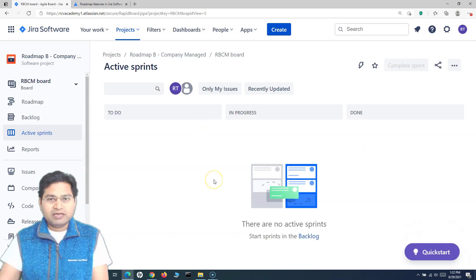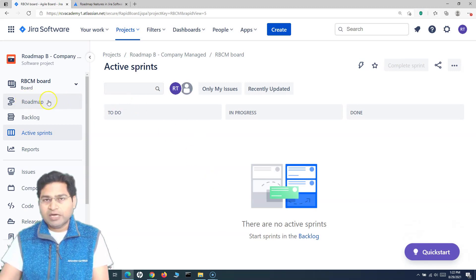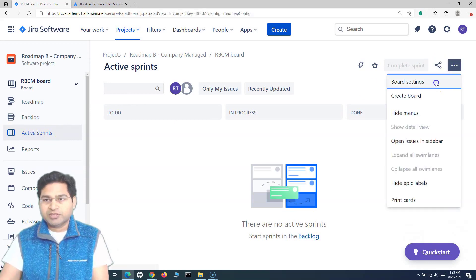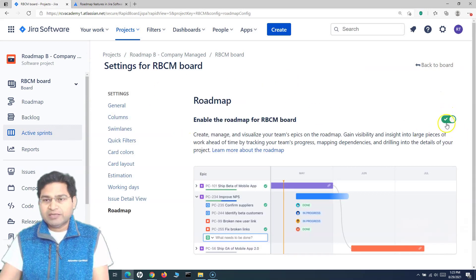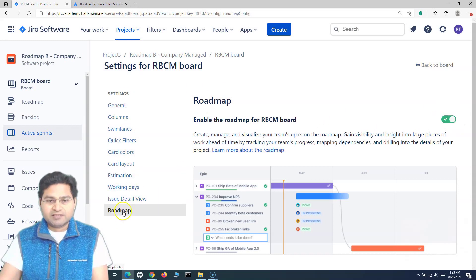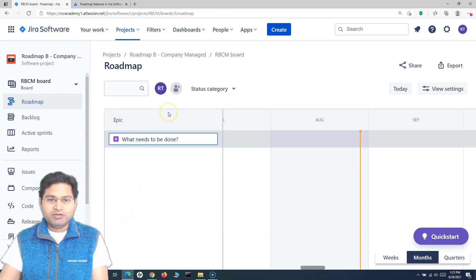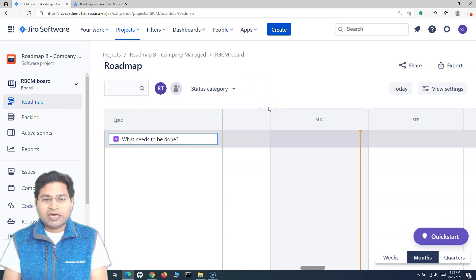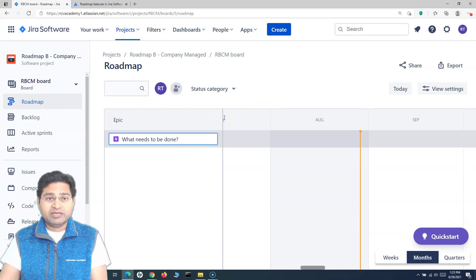Let's pick the company-managed Scrum project. If the roadmap is not available, go to the board, then Active Sprints, click the ellipsis, go to Board Settings, and the roadmap may be turned off — you can simply enable it there. By default, the roadmap will be visible as soon as you create a new project.